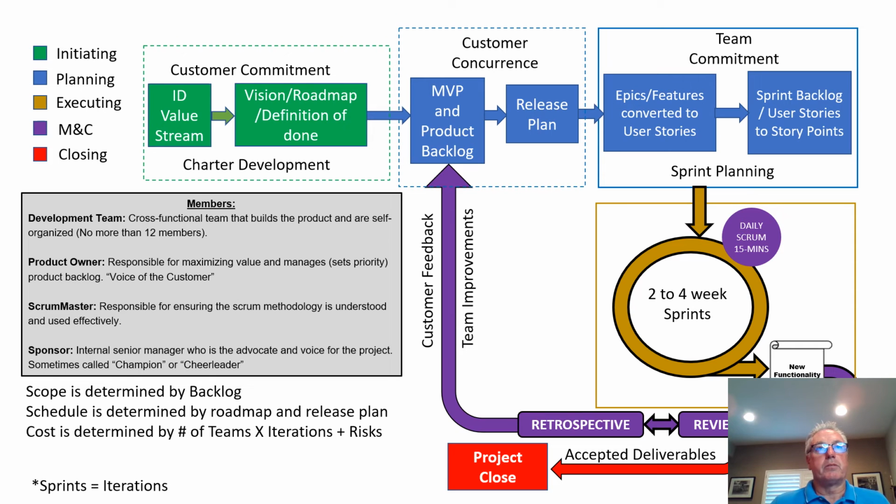At the beginning of a 2-week sprint and every day, we have a daily scrum. That's 15-minute max. Most people stand up for this. It's called a daily stand-up, and people will tell everyone what they're working on, what any resources they might need, and then after the daily stand-up, they get to work.